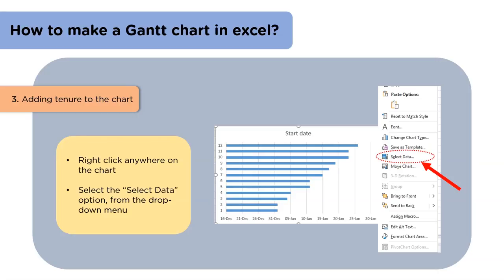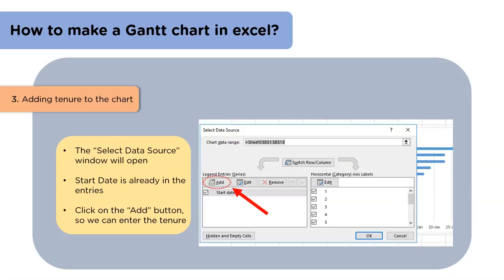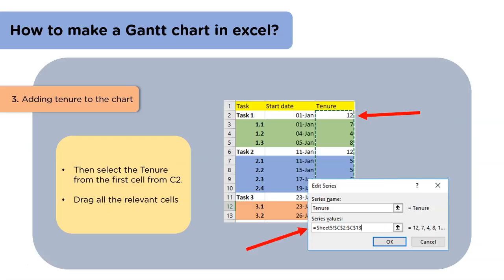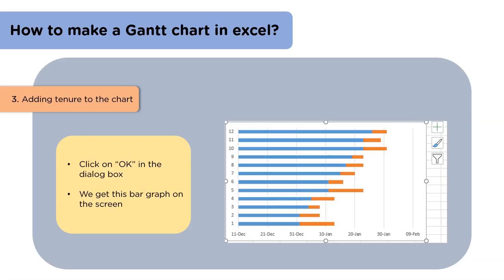In the third step, we will add the duration to the bar graph. We will right-click on the chart and in the menu that appears, we will select the Select Data option. In the window that appears, we will select the Add option. We can also see the start date is already in the entry section. Then in the dialog box that appears, type 'tenure' in the series name and click on the range selection icon. Now select the relevant data from the tenure column and click on OK. We can now see a bar graph with two colors on the screen — this bar graph now has the duration of the tasks.